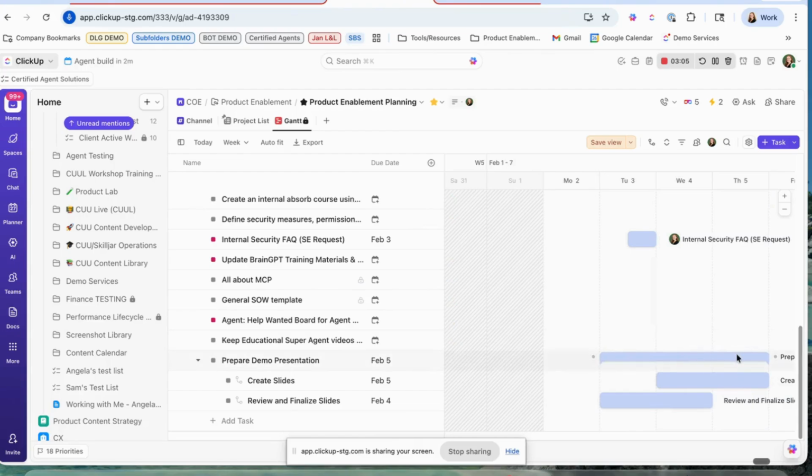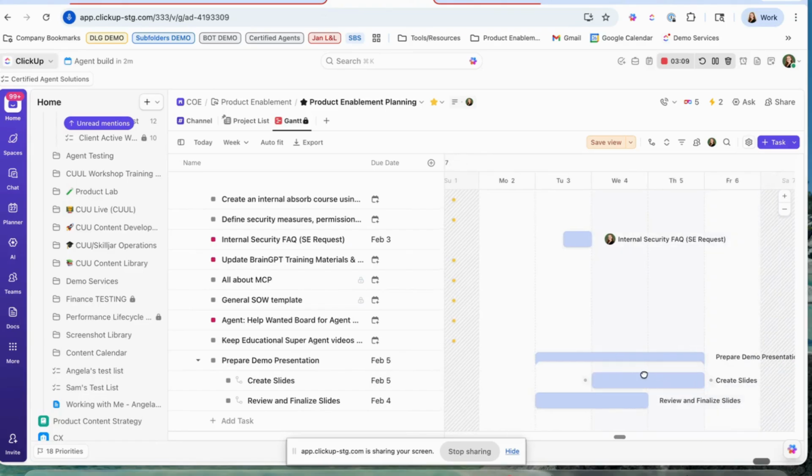And so this is going to change depending on where the subtasks are, which again makes sense. This represents the actual work we are doing for this task. So we want the parent task due date and start date to represent the dates on these subtasks.